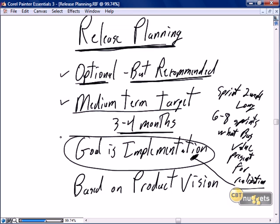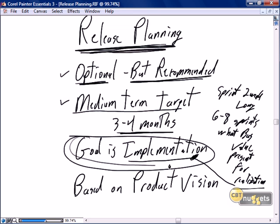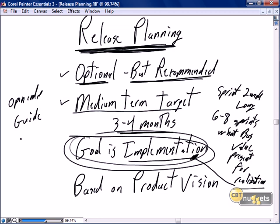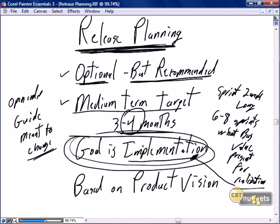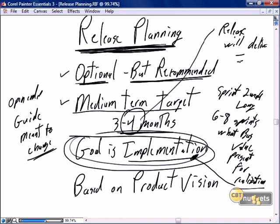With every sprint, the focus is on the completion of every story so that we have something of value that is potentially implementable. But a story in itself is too small to be implementable, so we combine stories into sprints and we expect to combine sprints into releases with the goal of implementation. The focus of release planning is that it is open-ended — it's a guide meant to change. At the beginning of our planning cycle we say: in four months I expect to have a release that will deliver certain business value.